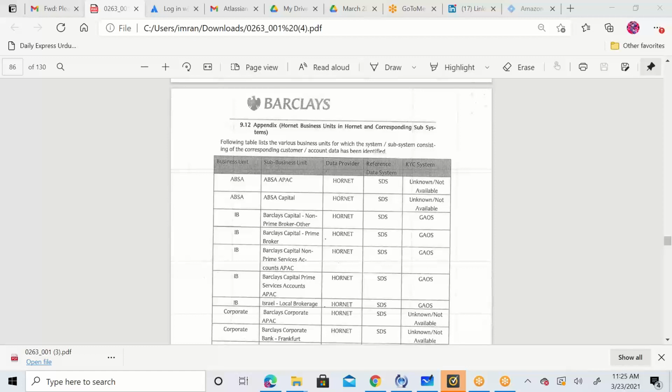Once it is approved, everything which is mentioned on it should be coded. Now, in terms of who's reviewing it and providing inputs, you simply put this document on a shared drive. All your team members have access to that shared drive without needing your permission. They can check it and put commentary on it. They're not going to change it, but they can put comments on it, and SharePoint stores the information, such as what date they opened this document.